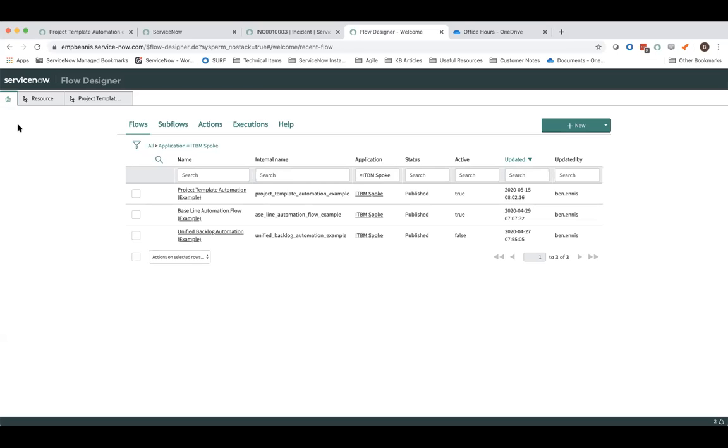If you're looking at a capacity management view and you had open projects with resource plans that still had some hours on them, technically those resources are still locked up for hours, but you might not notice because it's a small amount in the grand scheme of all the requests that come into the system. So I'd be curious to see what the numbers are behind instituting a simple thing like this to help with data quality. It'd be interesting to see the difference in the numbers on the charts.